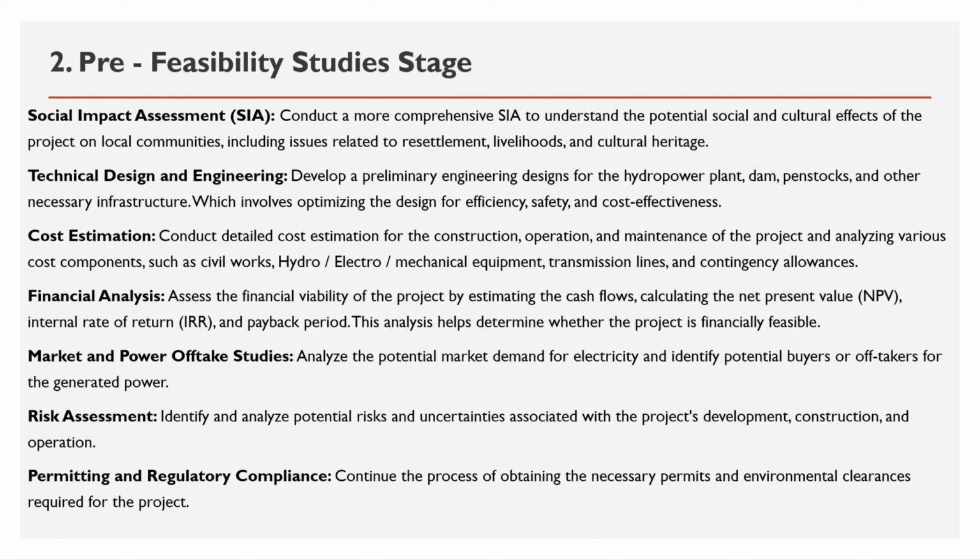Financial analysis. Assess the financial viability of the project by estimating the cash flows, calculating the net present value, internal rate of return, and payback period. This analysis helps determine whether the project is financially feasible.